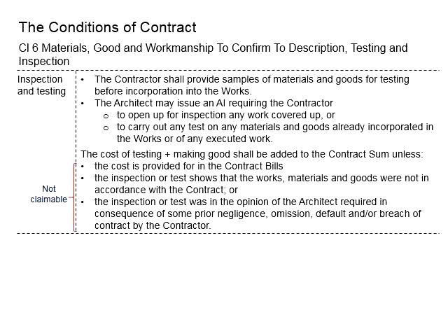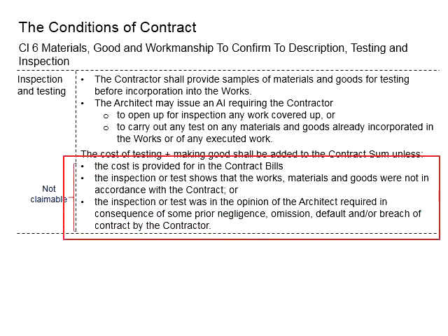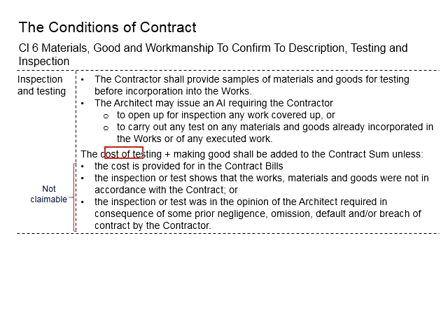Let's say now if the works provided by the contractor does not meet the requirements, this cost will be borne by the contractor. That is the general principle. These are the circumstances where the cost of the testing or making good of the inspection work when those materials have already been incorporated in the work. First, the inspections or tests show the works and materials are not in accordance to the contract. Now this is the problem of the contractor, and the contractor will have to bear the cost.